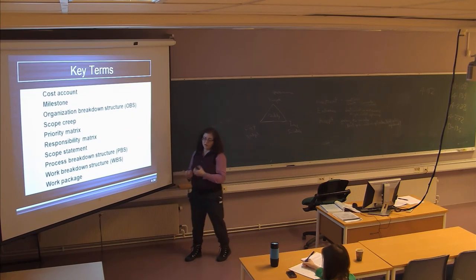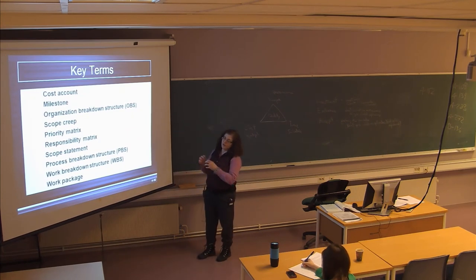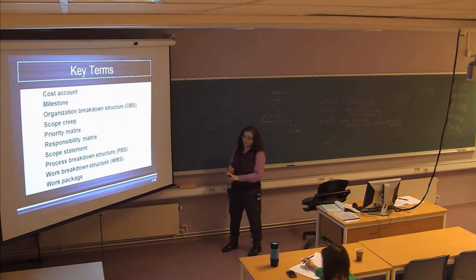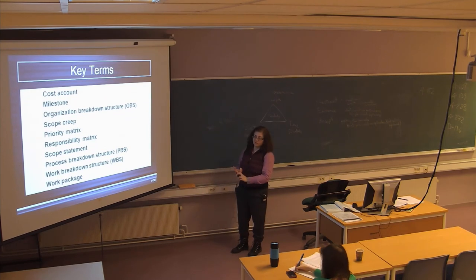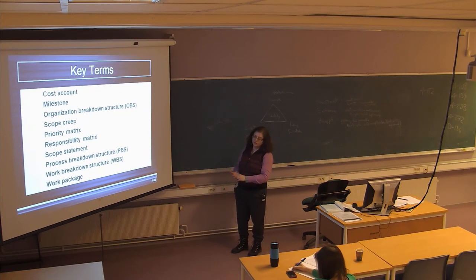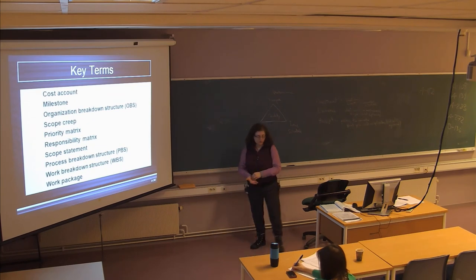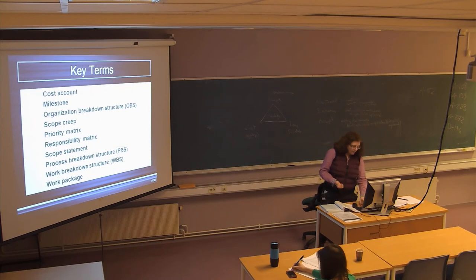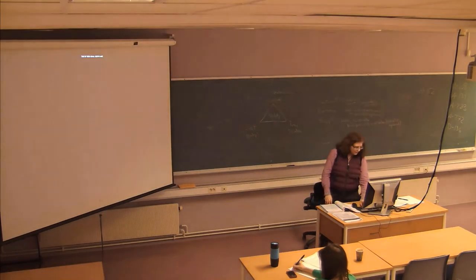Instead of making a physical product, the work package is the lowest level of the work breakdown structure where all of the activities are defined. With all of these work packages, they have someone who is responsible, a work package leader. They have a time scale when it starts and ends. They have a cost account associated with it, how much you can spend on it. And they have a list of activities and the expected outcomes or deliverables of those activities are all defined at the work package level. So that's where most of the stuff is defined.